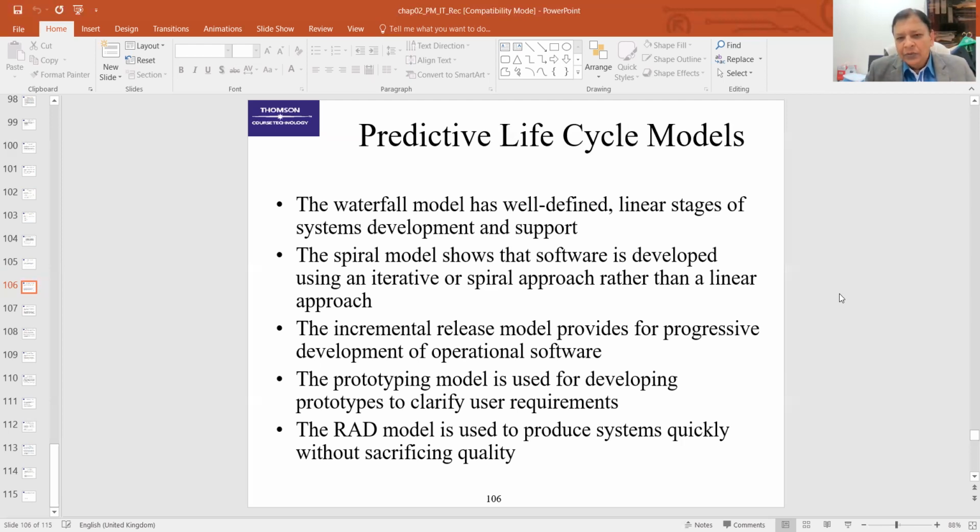Then, when you have modeling, analysis, and design, you do analysis, you collect requirements from the customer in detail. So detailed requirements are gathered. You feel your plan, your cost estimation, schedule estimations are not as per the detailed requirements. You missed some requirements during the plan that you found during the analysis. So you can go back and you can change your plan. That is the second sub-cycle.